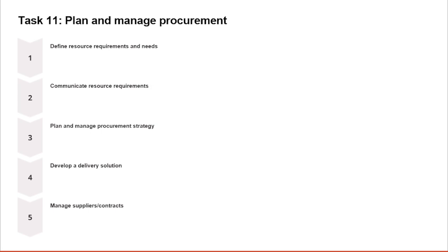For example, we talked about fixed price contracts, which are best for a well defined scope and shift the risk to the seller. Also, we talked about cost reimbursable contracts, which are used when the scope is uncertain and shift the risk completely to the buyer. We also talked about the third type, time and material contracts, which are common for staff augmentation and flexible service needs. So expect questions which may also involve handling supplier performance issues, enforcing contract terms, and managing disputes.